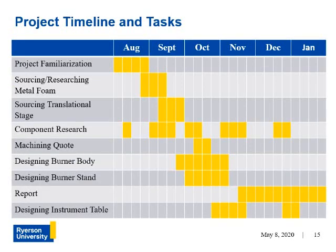Project timeline and tasks. The Gantt chart shows the timeline progression of the project tasks. The majority of the design tasks were heavily dependent on component research and what product information could be gathered from the retailer and supplier. The process throughout involved designing around available products. The project began with topic study and familiarization with combustion research. Components that were difficult to source, such as the metal foam and translational stage, were researched first.